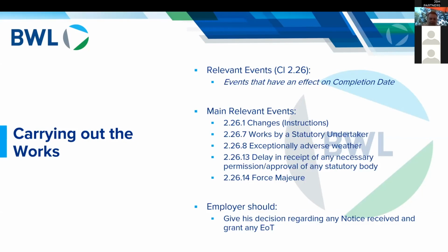So if you're a developer with weather events being a cause of change in the contract, you would want it to probably be defined differently to what a contractor would, because from a developer's perspective, you're wanting the project to be run according to schedule and on budget and to meet your expectations. Perhaps the contractor is looking at ways to have wiggle room to increase their potential revenue and profit. So how those terms are defined is quite key.